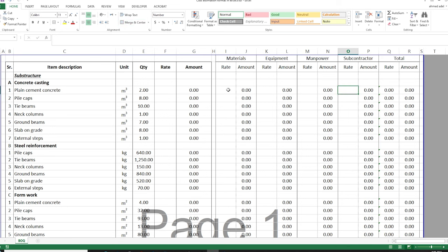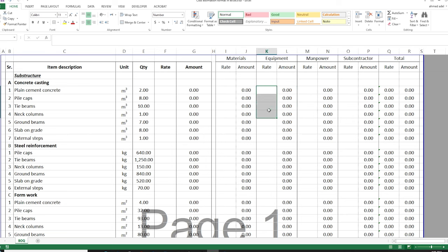The next part is that when you are estimating the cost, you will have additional tabs — a material tab, a labor productivity and activity cost tab, and so on. You will start linking these cells to your other tabs where you have estimated costs for manpower, materials, subcontractors, and equipment. I have done this in detail in our cost estimation course, but now let me just put some numbers to show how the formulas work.